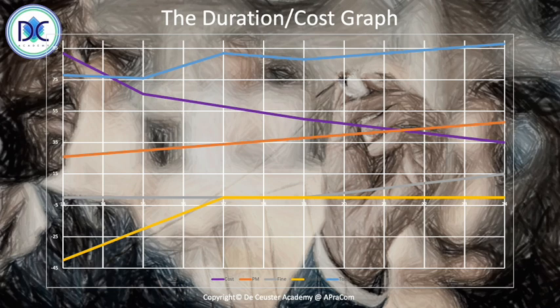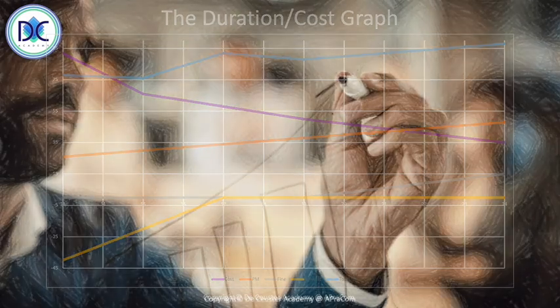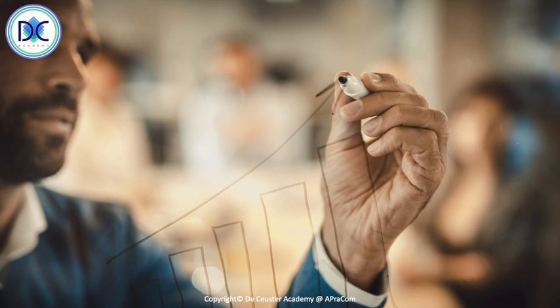And the total curve, the light blue curve, gives us the total cost for the project, and we see that the lowest point corresponds with the 15. So that's it for this video. The last element of case 2, we made a graph representing all these different costs so we can make a very easy selection.